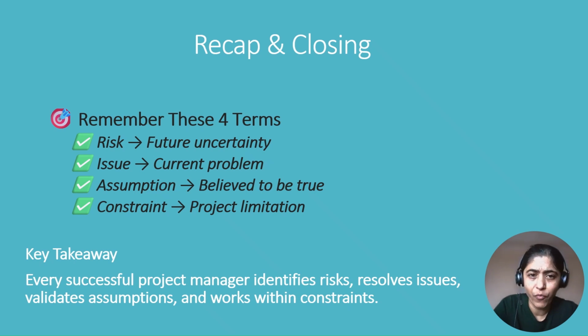Whenever you are confused, ask yourself these four questions. Could it happen in the future? That's a risk. Has it already happened? That's an issue. Am I simply believing it's true? That's an assumption. Or is it limiting my project? That's a constraint. Remembering these four questions will help you confidently identify project situations during planning meetings, stakeholder discussions,